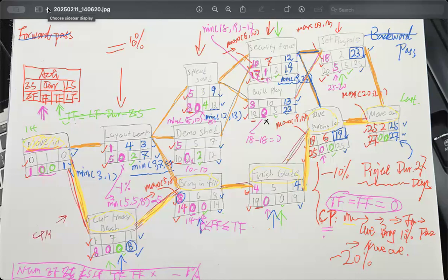but there is only one or maybe two or maybe three that are the critical paths, because we need to make sure all the activities in the critical paths should have the total float equal to free float equal to 0. But if you see a path like this, moving in and the cut and going to, yeah, that one, if you're starting from here, that's all critical activity.